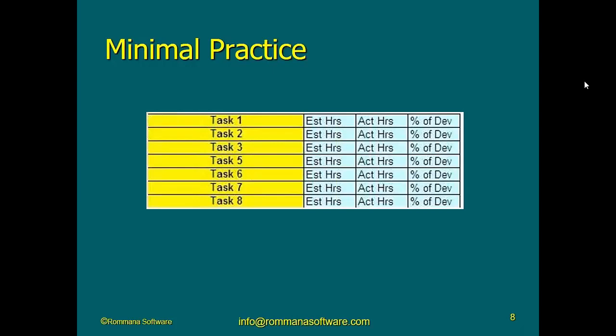Okay? So he stands there, and he looks at what he needs to do, and he says, okay, that's going to take me what? 8 hours or 16 hours or 24 hours, because he needs to know how many days he's going to spend on site. And he says, okay, that's going to cost you whatever, $300. And if I say, why? He says, because that's going to take me 3 days, and my day is $100. Right? I mean, am I telling you something you don't already know?